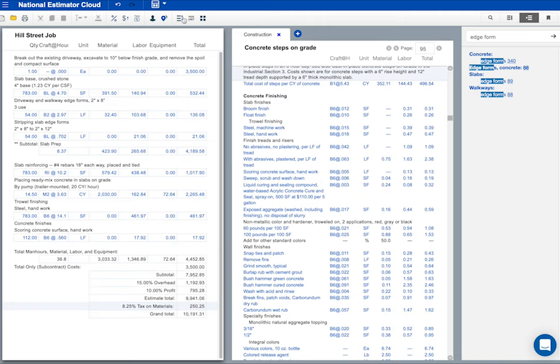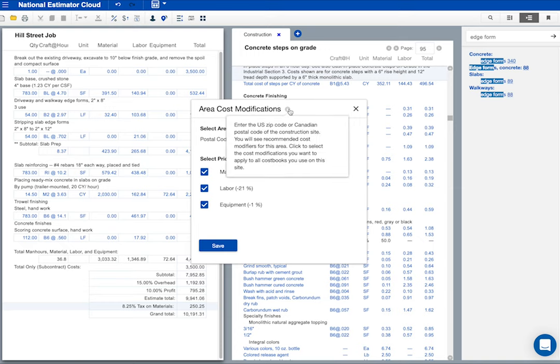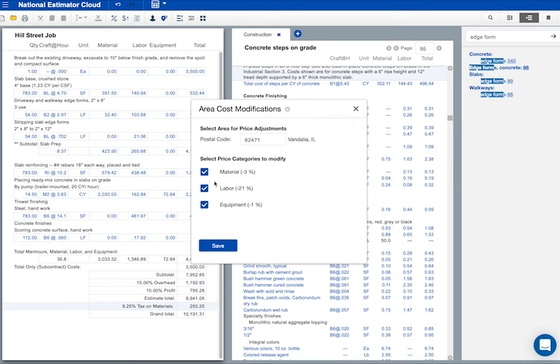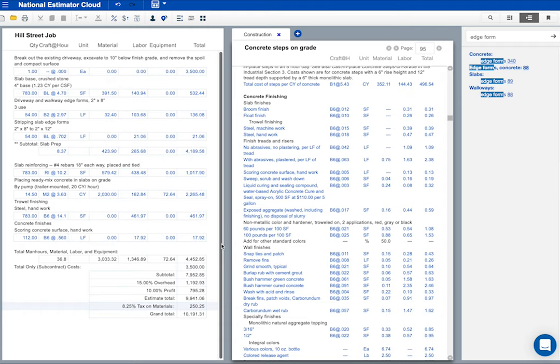I use this to adjust cost to the construction site. The information icon explains what happens here. I've clicked all three boxes because I want all estimates in the cost books modified by these percentages.